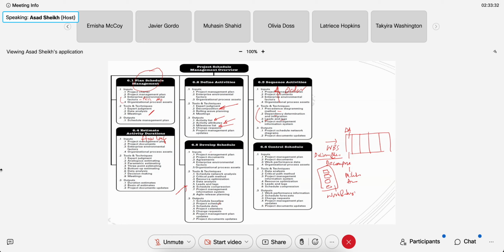But turns out he is going to do his little bit and pass it on to another team. They're going to do a little bit. They're going to pass it on to the third team. They're going to do a little bit. Then it'll be done. So what I was looking at was just one person, and I didn't know there were three persons standing right behind this person who he has to manage, and he wasn't able to manage them, and I wasn't aware. So what was the lessons learned?